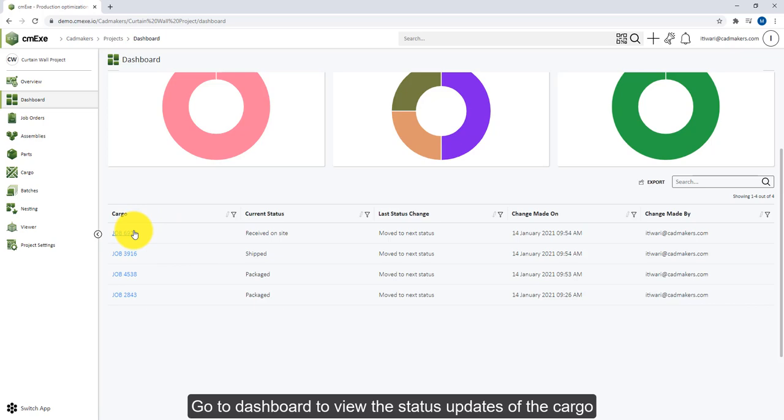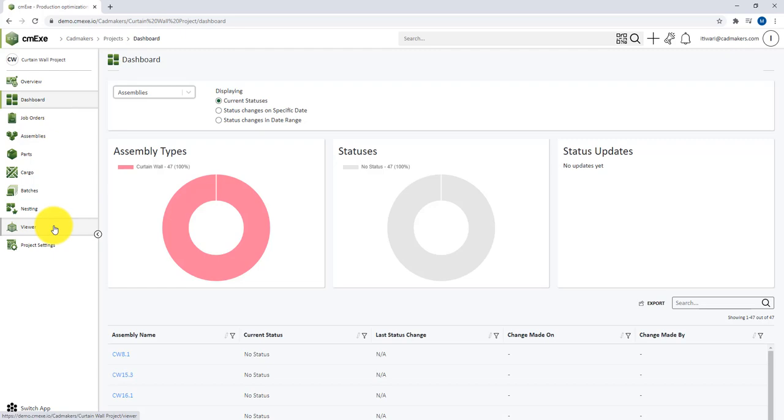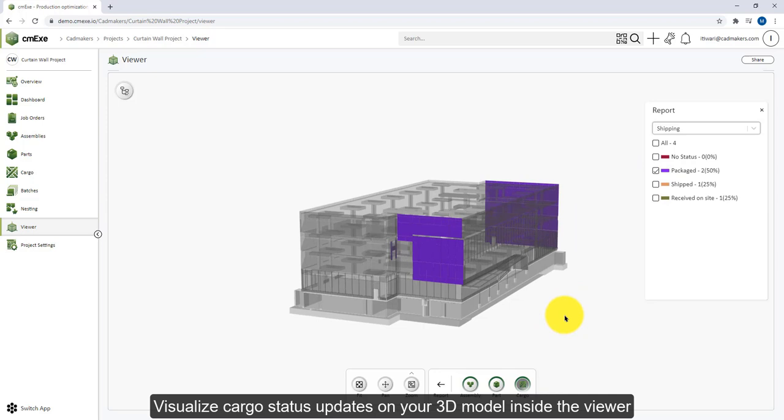You can also select the viewer option and view the status of your cargo visually on the 3D model. Click on Report, go to Cargo, and now you can view the status of your cargo assemblies in the form of color-coded information overlaid on your 3D model. So that's how you can create cargo, track the statuses, visualize the status changes, and view the progress report for cargos inside CMXC.